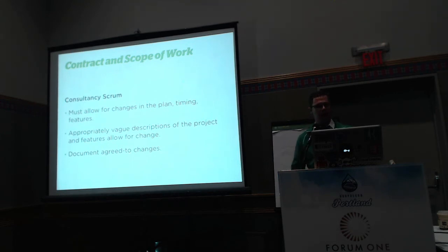We have language in our MSA, Master Service Agreement, that says we're going to do everything agilely. That means there will not be change orders. That means that often the direction of the project will change based on a conversation. And that's what we mean by agile methods. We define it in our contracts.